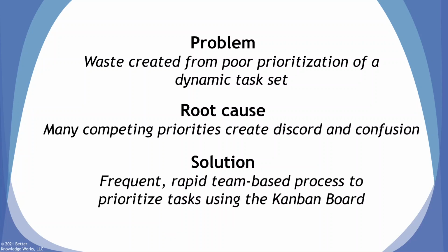We'll solve this with a simple, clear, team-based prioritization technique. It's going to increase engagement and it's going to reduce ambiguity. And the way this works, we'll have an internal group of people that act as a sort of steering committee for the team to decide what needs to be done in the immediate future. And from there, we'll have a 15 or 20-minute meeting once a week to prioritize for the people doing the work. That way we remove the ambiguity and we have the team working together. So that's our Kanban board. That's the concept of it.